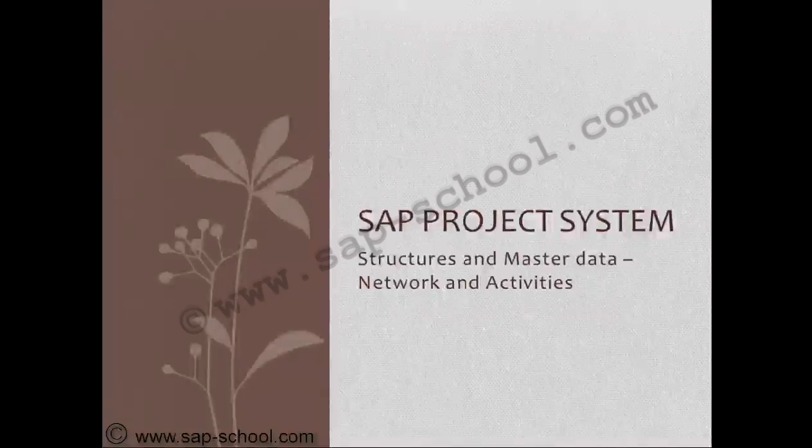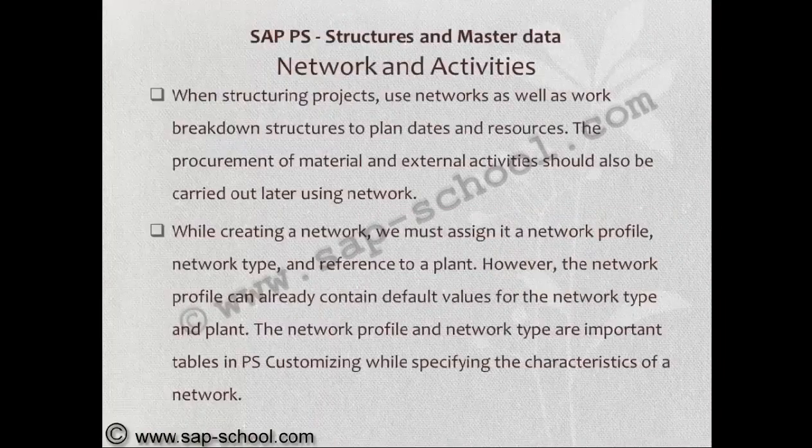Now we'll see the next topic of structures and master data, that is network and activities. When structuring projects, use networks as well as work breakdown structures to plan dates and resources. The procurement of material and external activities should also be carried out later using network.